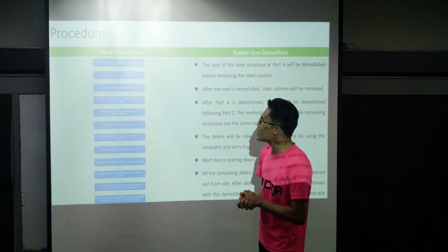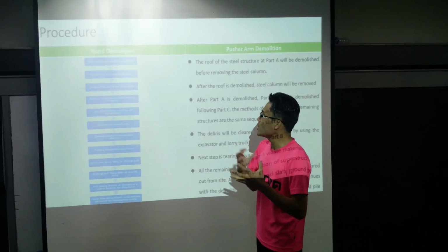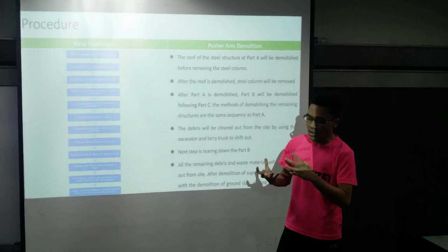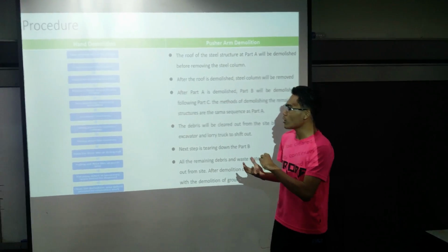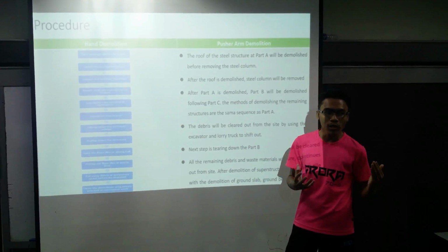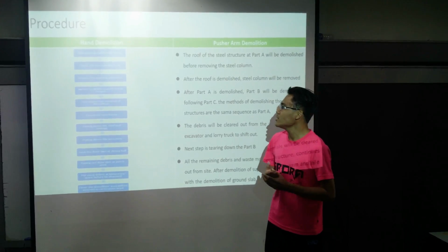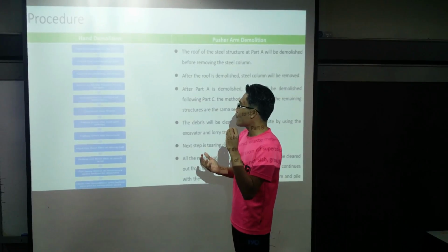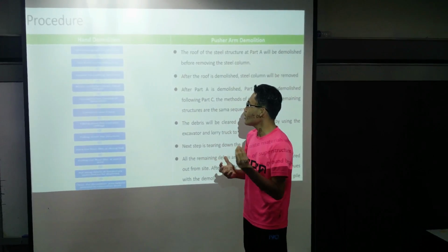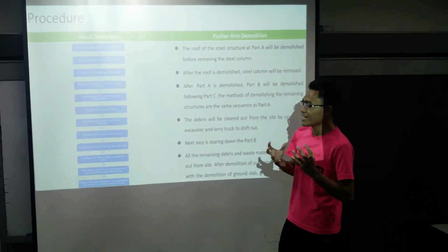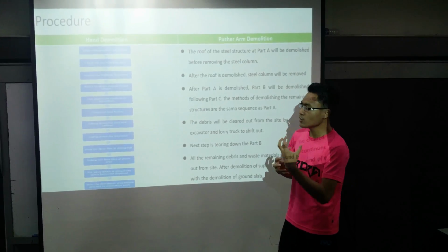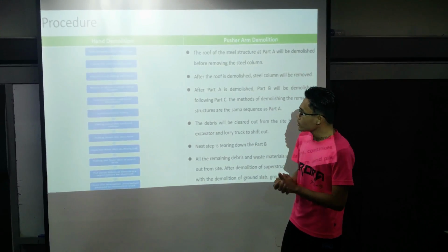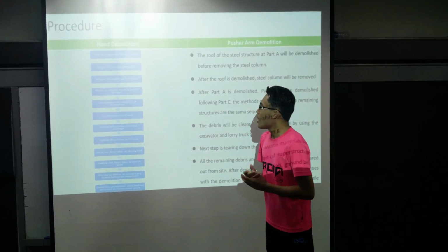The third one is that after that we do some inspection of the building structure to see whether it is risky to carry out demolition on that part, for example the column and wall. And the fourth one, we have to notify Majlis Daerah Bandar Perak, Daerah Perak Tengah, so that they can give approval for the demolition process.